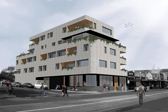Yeah, it's obviously the site itself is a tough site to build on. Even a conventional build, it's a tough site to build on. You've got two streets. You've got trams. You've got power lines. So it is a tough site, but really the traffic management, the scheduling, the coordination, the crane placement, all those sort of things are the first things that come into play when we start to plan these assemblies. It's not as easy as parking a concrete pump there for half a day and you've got a deck. It's precise scheduling of deliveries and understanding what you can realistically achieve in a day, so you're not blowing money away.